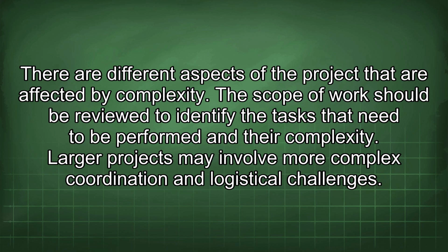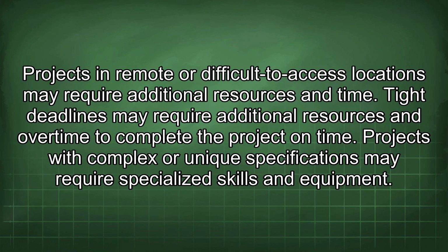There are different aspects of the project that are affected by complexity. The scope of work should be reviewed to identify the tasks that need to be performed and their complexity. Larger projects may involve more complex coordination and logistical challenges. Projects in remote or difficult-to-access locations may require additional resources and time. Tight deadlines may require additional resources and overtime to complete the project on time.